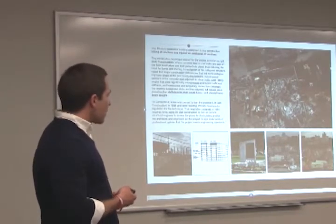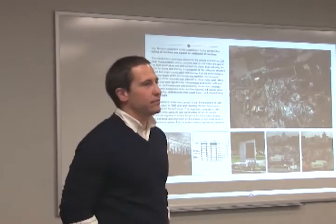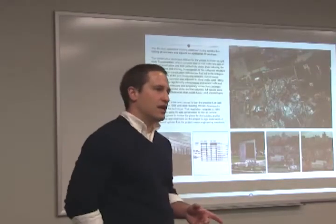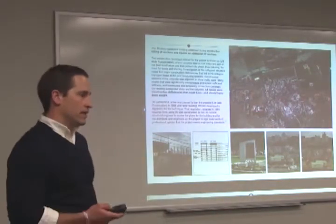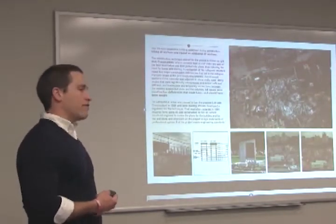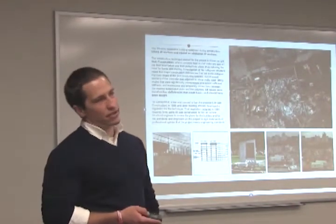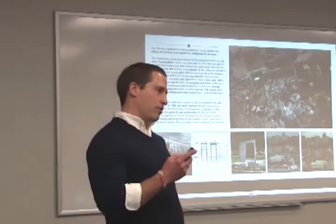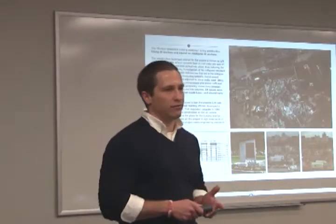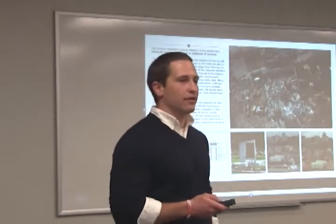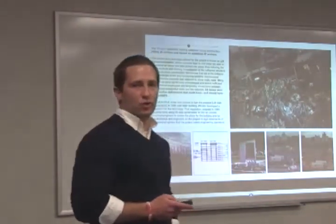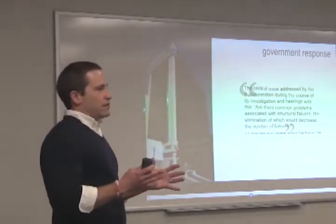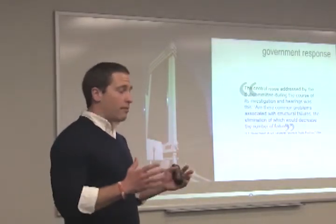After that, Connecticut put a ban on lift slab construction while they investigated it. Following their investigation, it is now allowed again, but it is required that you have third-party structural engineers and architects review all specifics of the process and the plan. Then all the contractors, the designers of record, and this third-party review have to sign off together, saying that it has been checked and is suitable for construction. Those are a few of a bunch of major failures, unfortunately.